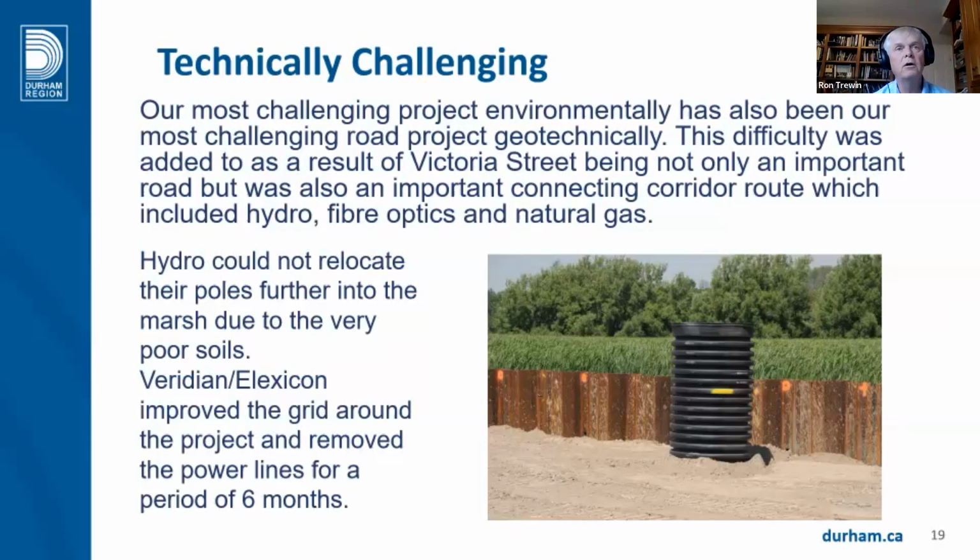You'll see here in this picture, we did not want Hydro or Lexicon, when they installed the poles, destroying our tiebacks, so we installed vertical HDPE pipes, which they could place their poles into once we completed filling.